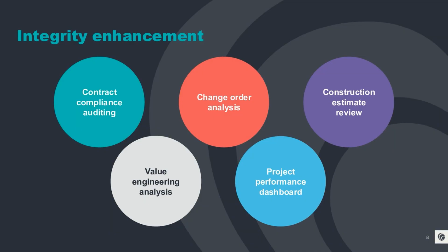Changes in condition, changes to plans, changes to owner expectations, schedule adjustments, all of these lead to additional costs on a project. However, what are those project controls that are evaluating those change orders? Are those change orders being priced according to the terms and conditions of the contract? Are the project management professionals holding the contractors accountable to the highest level of quality with their change order?